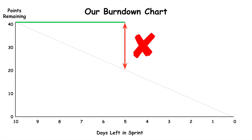Here's another example. Again, 40 points, two weeks. At the end of the first week, nothing has been accepted by the product owner, so no story points have been completed. We'll often see this if a team has developers who write code and throw it over the wall to testers on their team. The developers are busy at the start, but nothing is getting done because the testers are waiting for the developers to finish rather than pairing on test-driven development. No matter how they got here, a team that frequently finds itself in this position will struggle to deliver reliably.